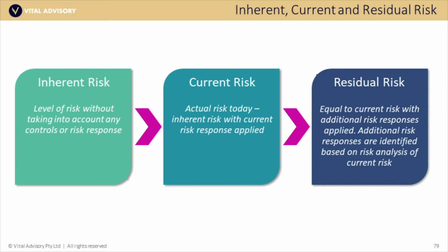And when you're reporting risk, so if you're reporting risks to your leadership team, there are two basic risk information types that I'm reporting. One is the risk treatment plan and its status. In other words, how are we going fixing the risks that we know are not acceptable? But also this one around inherent risk. What is the current state of inherent risks, and how good is the current control environment today to keep it down low? So just something to think about from a reporting perspective.